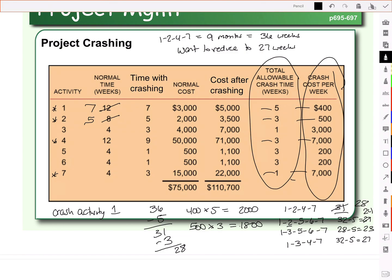Now notice the path 1, 3, 5, 6, 7. It doesn't contain activity 2. So does it change? No. So neither does the 1, 3, 4, 7. It doesn't change either. So again, we look at our paths and notice that our critical path still takes the longest, so we're still on the same critical path.